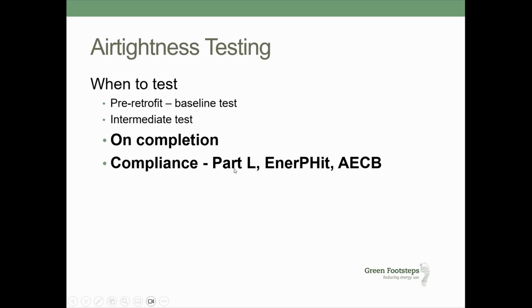So the on-completion test is really only needed if it's for compliance, Part L if it's a new build, but for retrofit you would need an on-completion test. But really the most important one is that intermediate test.